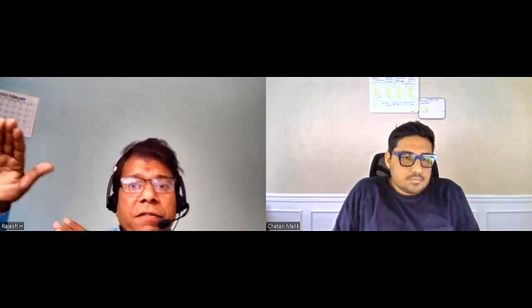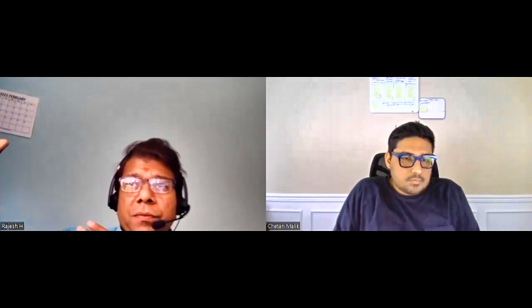And then at a certain point, we took 40. Then after, if you go for 45, we're going to miss it. We only delivered 42, right? Then we say, okay, we're only going to take 42, and we delivered 40. So that will even it out. Now we don't want to take more than 40. Okay, that makes a lot of sense.